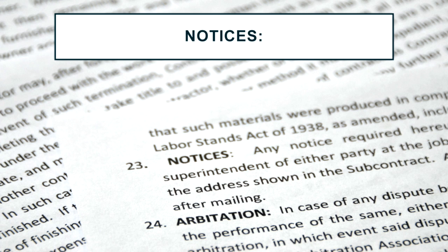Paragraph 23, notices. Again, notices are so important, you have to pay attention to them. I would recommend you make a cheat sheet of all the notices that you have to do and the time frames in which you do them. But don't disregard putting anyone on notice, whether it may be for a delay, it may be for a change, whatever it is.